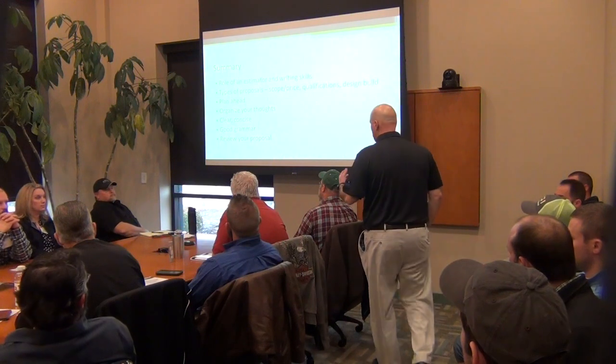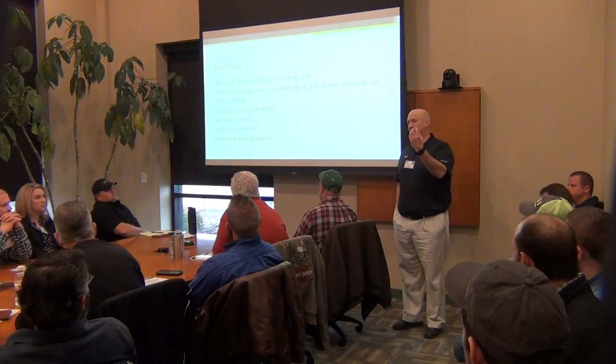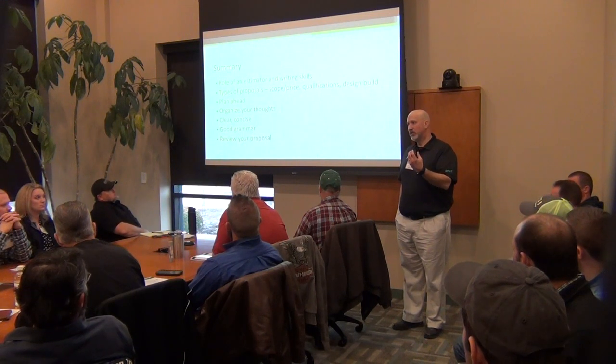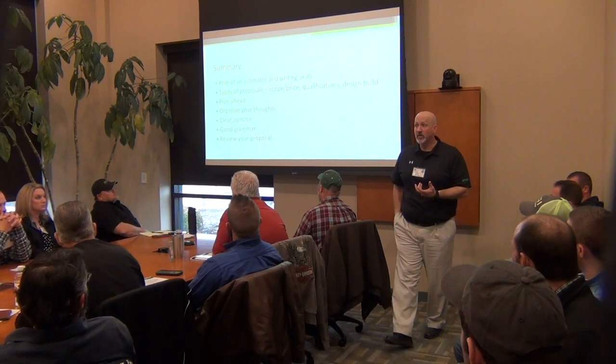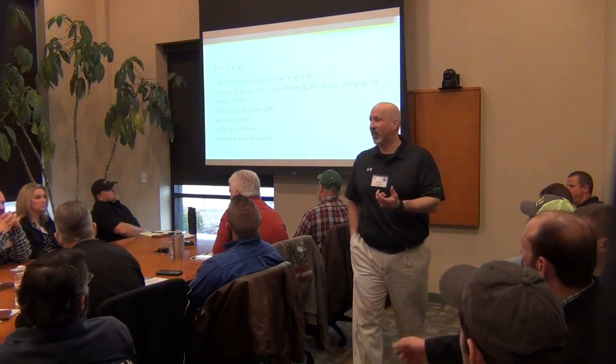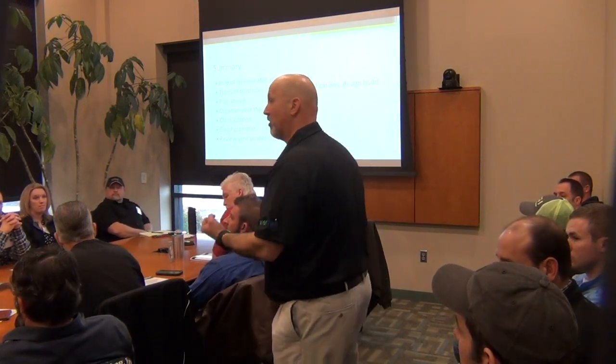You have to make sure in some way or some form that your scope is included as an attachment. You have to make sure. And if they won't do it, then it may be somebody you don't want to do business with. I'm sorry, because there's an underlying reason there, right? There's a reason they don't want to attach that. And it's probably not in your favor.